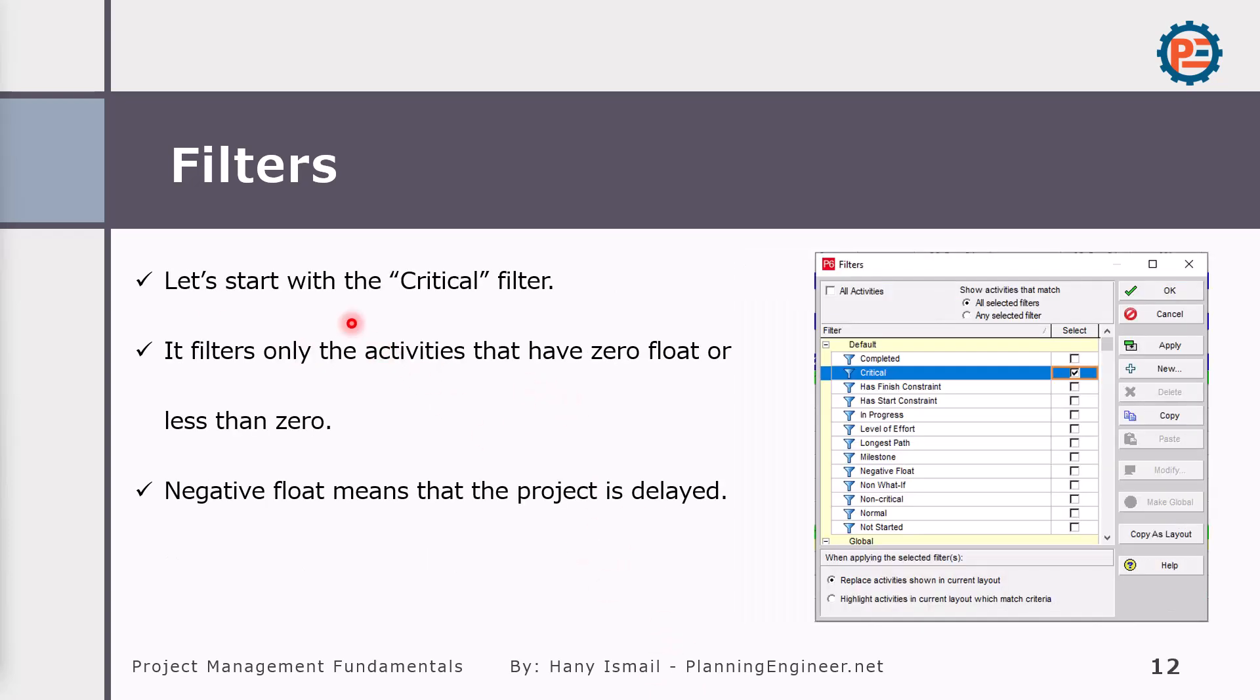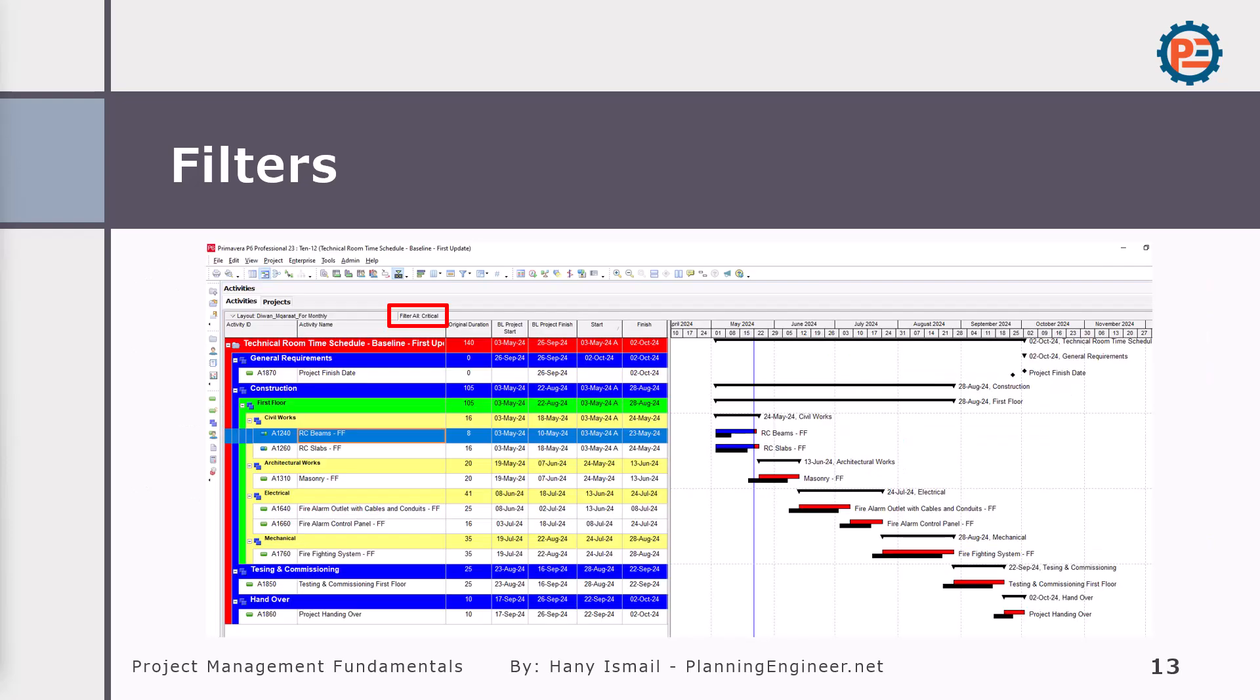Let's try one of them. Now we will create a filter to filter the critical activities. This filter will show the activity only with zero float. I'm expecting to see something like this after applying the filter - it will show me the activities which have zero float.